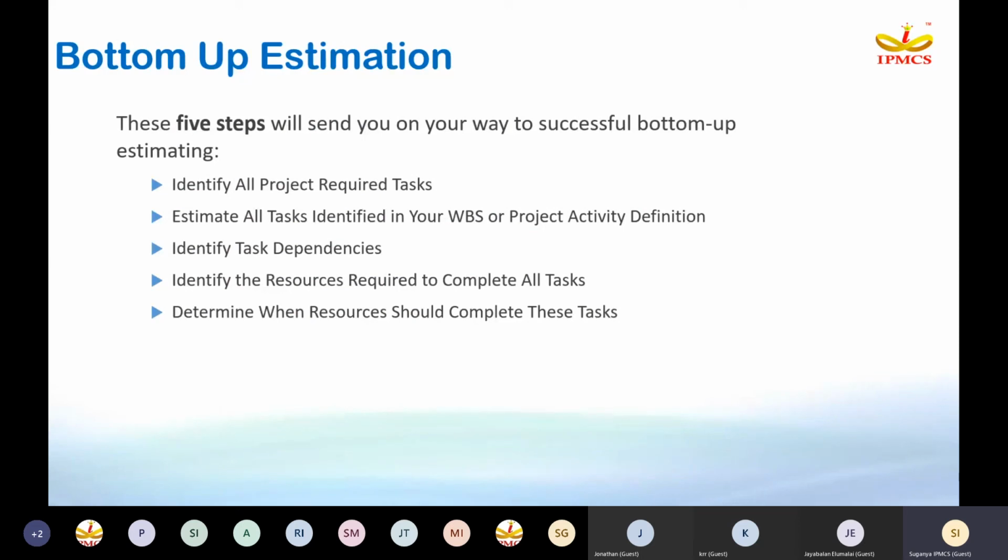So work breakdown structure is nothing but splitting your project into major phase wise or major deliverable wise and splitting it further till the activity level. So now for each and every activity, when you assign what are the types of resources needed and how many number of resources needed, then for one activity, you will be able to find out totally how much cost is needed to complete the particular activity along with the help of the resources availability and allocated. So now if you are able to find out one activity cost, you'll be able to summarize it to the particular WBS level. Then all the WBS add up and it will show the overall project budget.